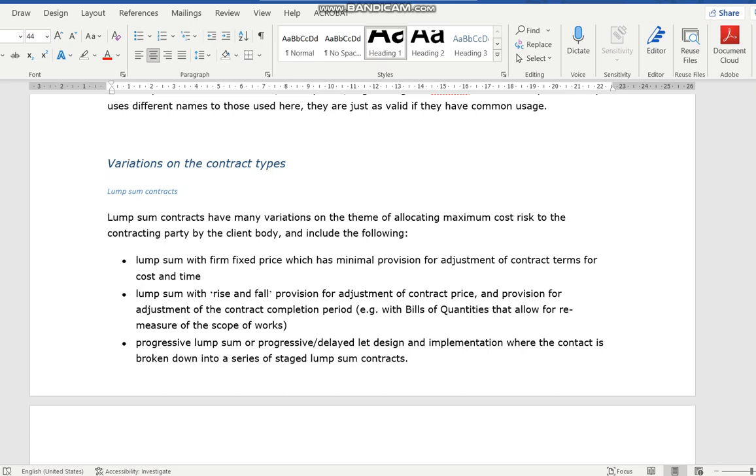It's just that as you go along, the rates are actually fixed. In terms of lump sum, rates are usually fixed, but it's the changes that you make in the final quantity that will make a difference to the final sum of money, you see.